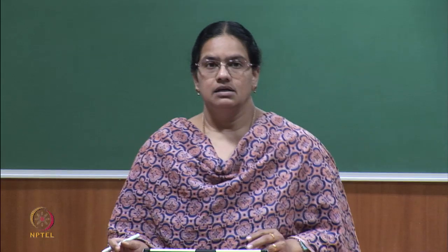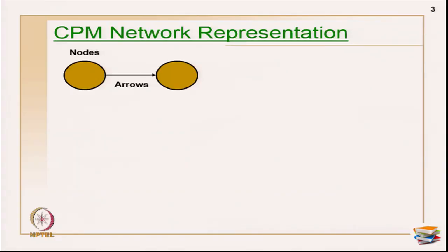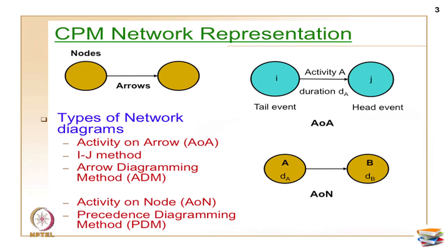CPM network representation generally has two terminology elements: nodes, which are generally circles or rectangles, and arrows. In the two types, the way you represent activities along nodes or arrows gives us the two methods. There are two broad categories: one is called activity on arrow diagram, famously called AOA, and the other is activity on node diagram, which is the AON method.